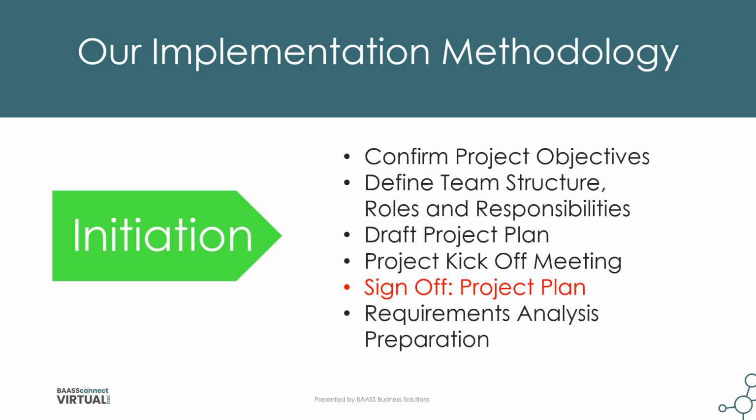In the kickoff meeting, we review the draft project plan, so all members of the project are aware of key milestones. At this time, this is when our first sign-off happens on a project. That's the project plan. From here, we can start planning our resources on both sides of the project. At the same time, we begin our preparation for our requirements analysis sessions.